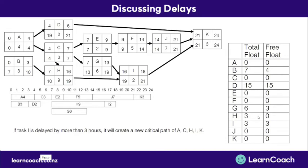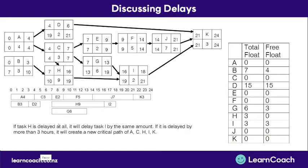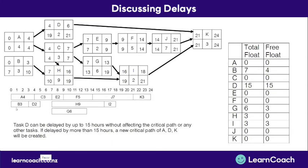Task A has a free float of zero hours, meaning if it's delayed at all, it will delay task I — the only task that depends on task A. Task A's total float is three hours; if delayed by more than that, it will extend the project's minimum completion time and create a new critical path of A, C, H, I, K. Task D has a free float and total float of 15 hours — if delayed by more than 15 hours, it will extend the project's minimum completion time and create a new critical path of A, D, and K.